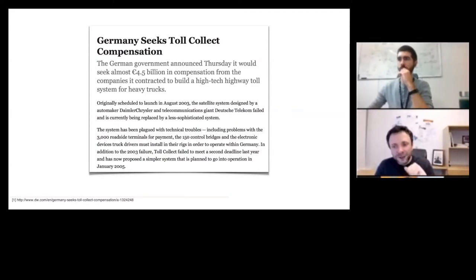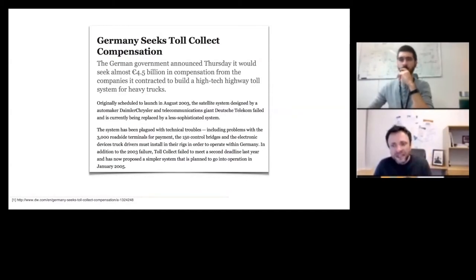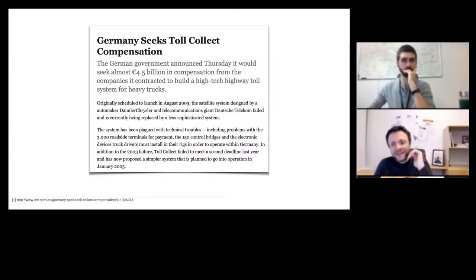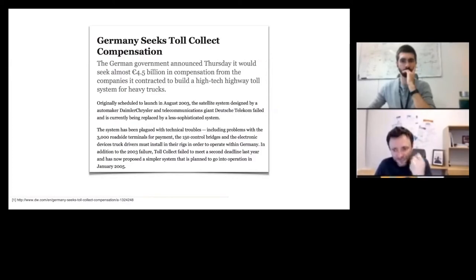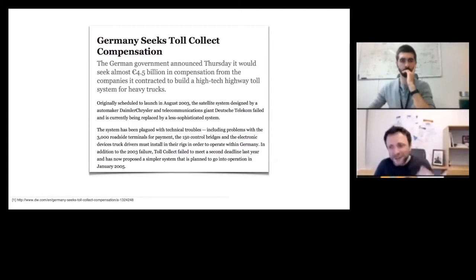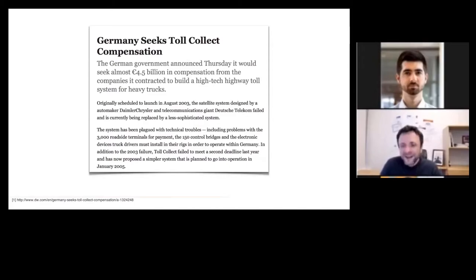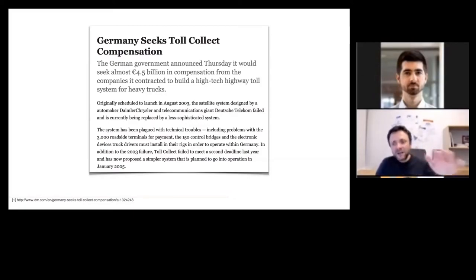The management board of Toll Collect was frequently changed because they never met any deadline. At the very end, they got imposed one fixed deadline: either deliver or let it be. What Toll Collect then did with a new team was define timeboxing — meaning you define one deadline and deliver a product at all costs towards that deadline. If you have to remove certain features, if you cannot deliver to the quality that you intended, then deliver to a slightly degraded quality, but deliver. They were still over time, so they decided on feature stripping — removing features originally planned for this release and putting them into the next release.